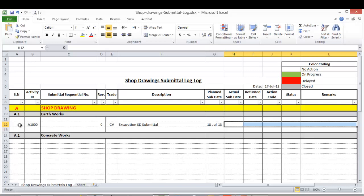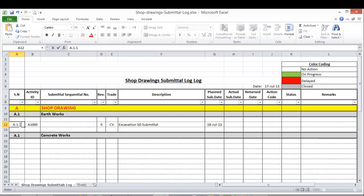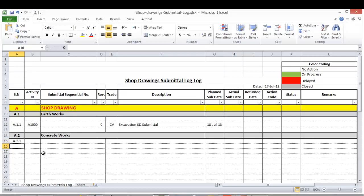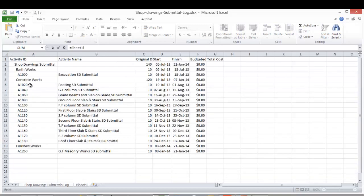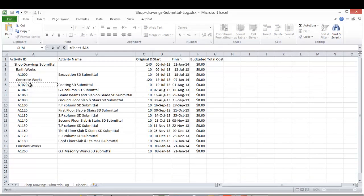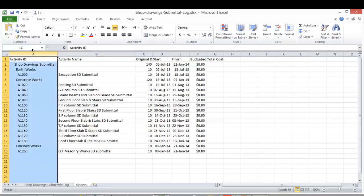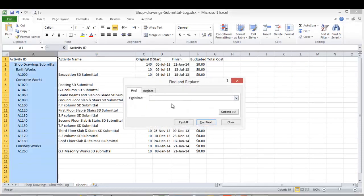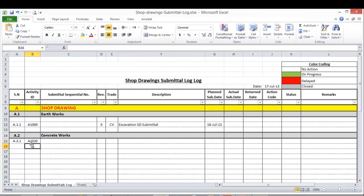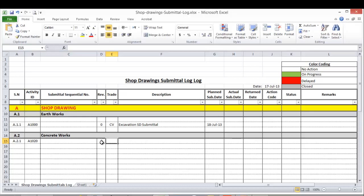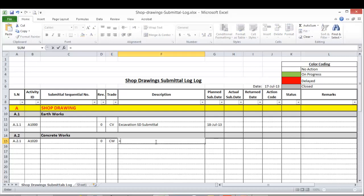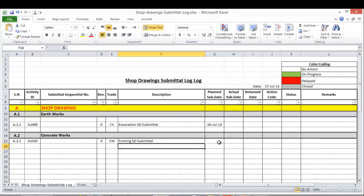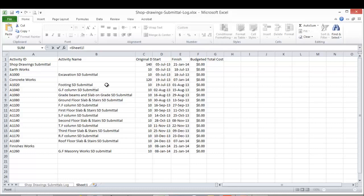For the concrete work, this is A.1.1, this is A.2, and then A.2.1. The activity ID for the concrete work - we can make it equal to this one, starting from the footing. Then we can use find and replace - make two spaces and replace all in order to remove all the spaces. Here revision zero, this is concrete work, and this equals this, and the plan date again getting them from the finish date.